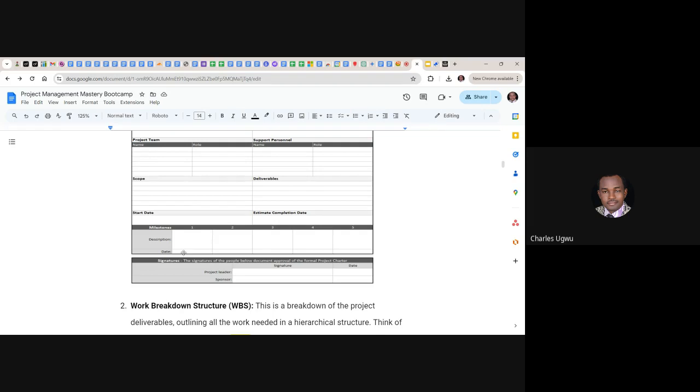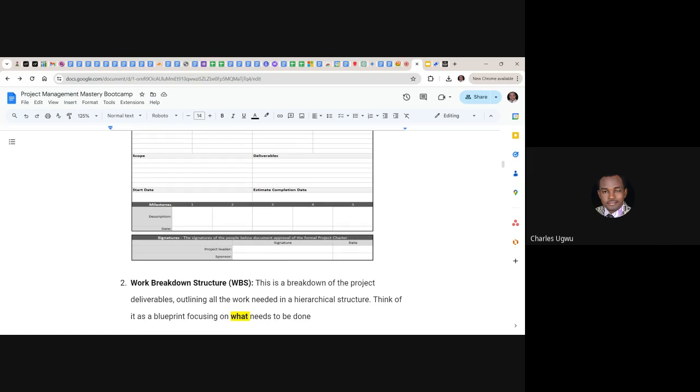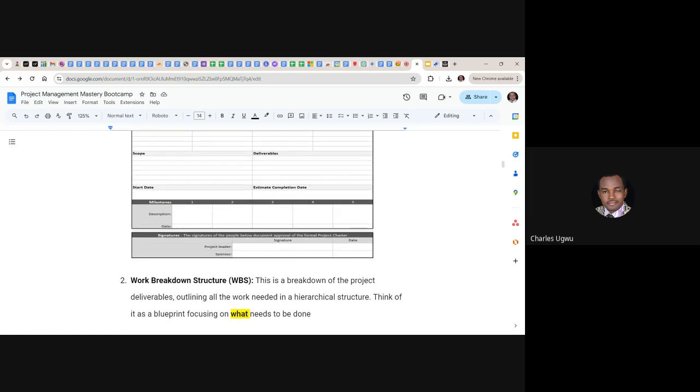So after then, you see all the milestones, there must be a date for the milestone. According to your timeline, you must provide an expected date for every milestone. That will help you to know when you are progressing. If you are not meeting your dates, you should know that is a problem for you.